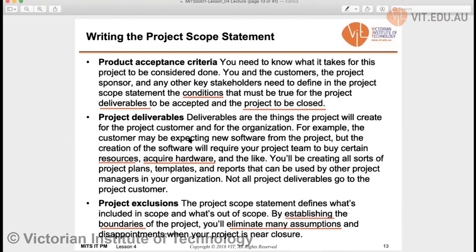Project deliverables are straightforward. For example, a customer may be expecting new software from the project, but creating that software will require your project team to buy certain resources, acquire hardware, and so on. You will also be creating all sorts of project plan templates and reports that can be used on other projects. This means not all project deliverables go to the project customer — your customer may expect two or three deliverables, but to achieve those you have to create additional deliverables.